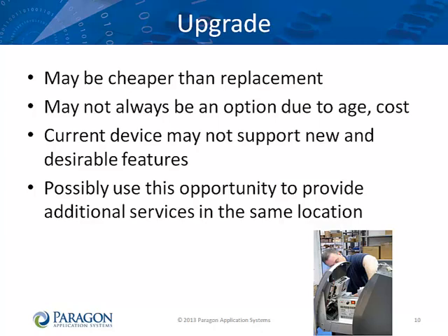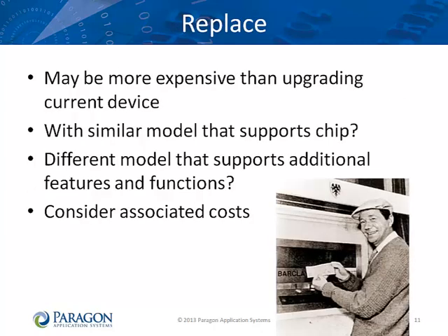the same location. It is expensive to replace an ATM, but if it is necessary, decide whether you want to replace it with a similar model that supports EMV, or will you use this opportunity to purchase a different model that not only supports EMV, but also allows you to offer additional features and functions. Consider associated costs for infrastructure and communications. If the new ATM is not exactly the same size and shape as its predecessor, you may face structural changes.